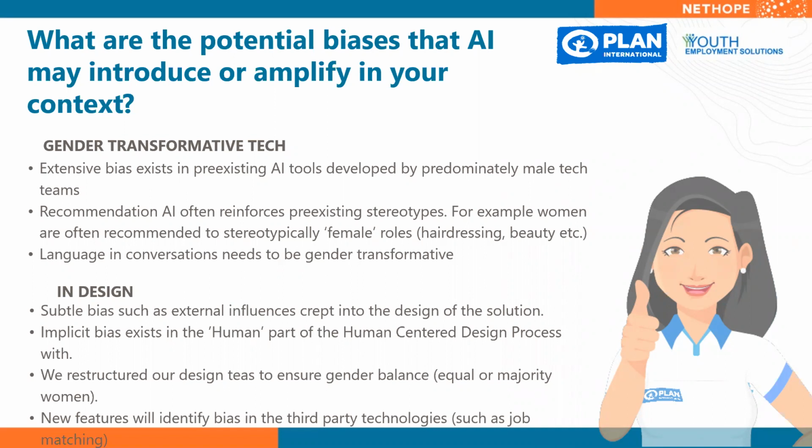And some of them are really simple and things that you might not think about. I did a presentation at NetHope a couple of weeks ago, and I was perhaps too honest, because a lot of people said, oh, we really appreciated your honesty. But I think it's really useful to share that with everybody, because it started from day one. We were developing a product for young women, and yet our product owner and lead of the whole project were both men. The person that wrote our first conversation was a male that lived in the UK. And then when we had user testing, we'd try and get young women, but often the young men would still turn up more, because they wanted to be involved. Our user experience teams were like this as well. So we really had to restructure everything.